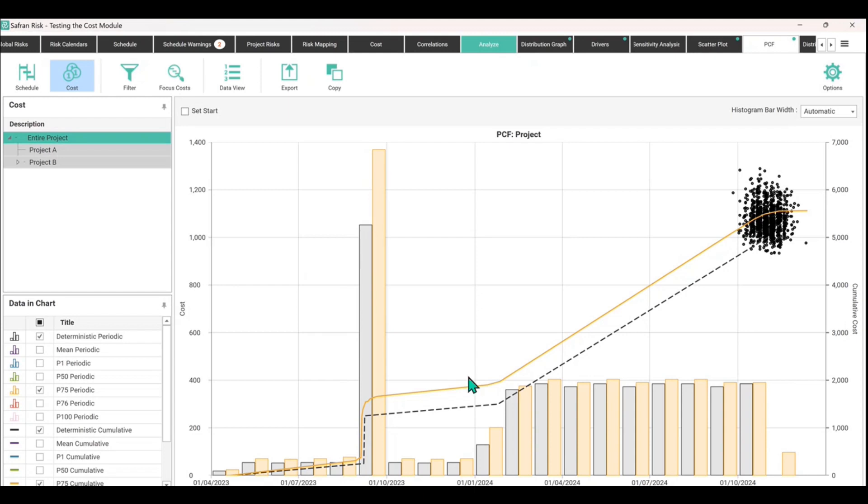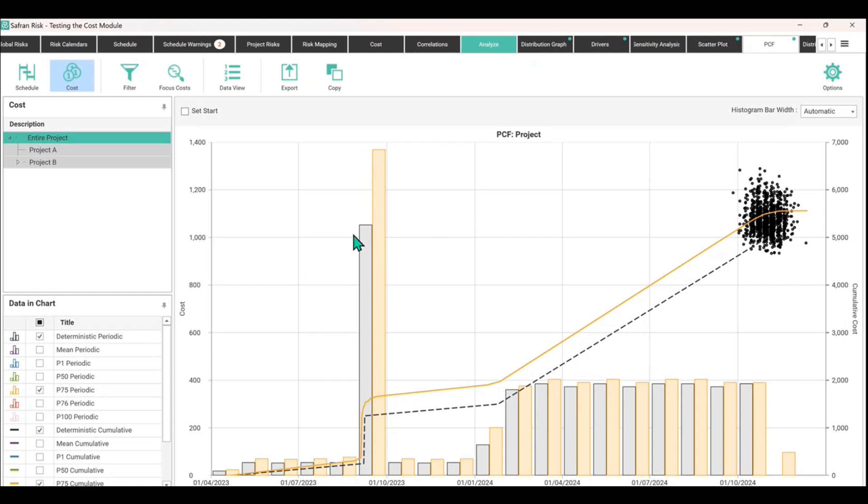In fact it looks like a gentle overspend in virtually every single period. Obviously if you started adding in opportunities to the risk register of potential cost saving or duration saving, then this would potentially flip that around and lower those bars beneath where the gray is at the moment.